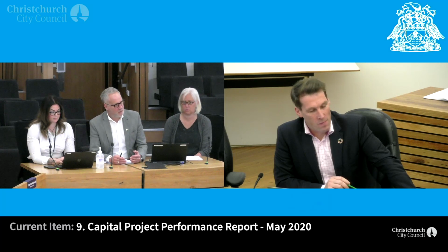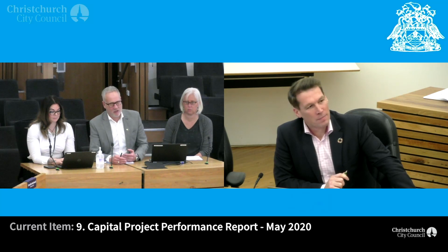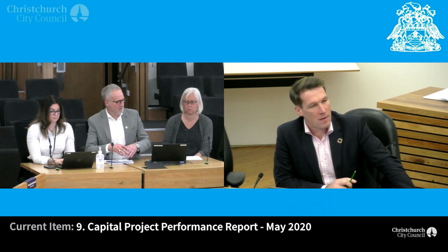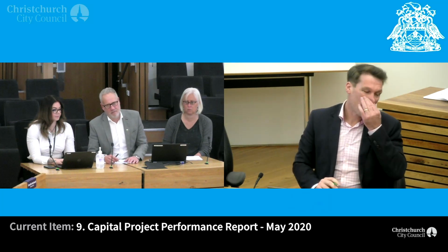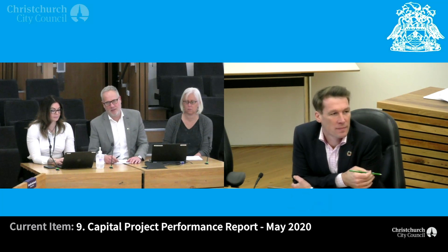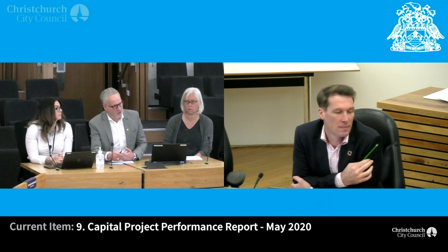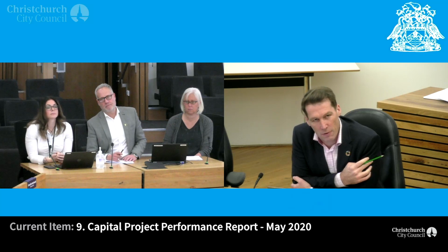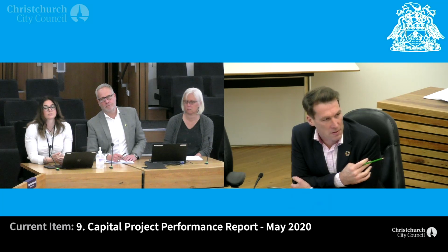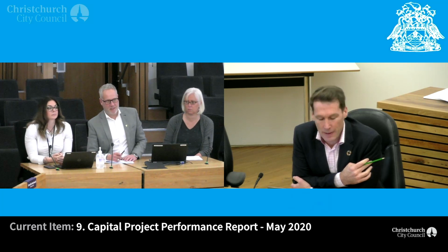NZTA approvals is another one. We don't want to go to detailed design or contract until we've got NZTA approvals, and that can be pretty slow in coming. So a lot of our projects, and perhaps it's a good thing for us to report to you on because it's relevant to the craft as well in terms of delivery of that program of works, take years of lead-in time before we issue the contract. Years. And so therefore, it'd be fair to say that we don't have an issue with contractors and capacity within the contract. Plenty of capacity at the moment.